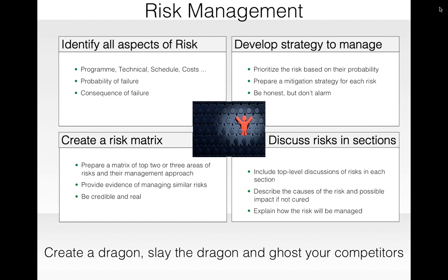Risk management is a very good way of competing where you have a very price sensitive competition. In that case, use risk management. Typically I have seen, and I use risk management as a differentiator: you may go in for the cheapest or the lowest priced product, but these are the risks underlying it, and this may finally make you end up paying much higher than what you are paying for the product or the service. So the total cost of ownership goes up because of the risk. And not only does the cost of ownership go up, it also dilutes your image as a project delivery organization from the customer side.